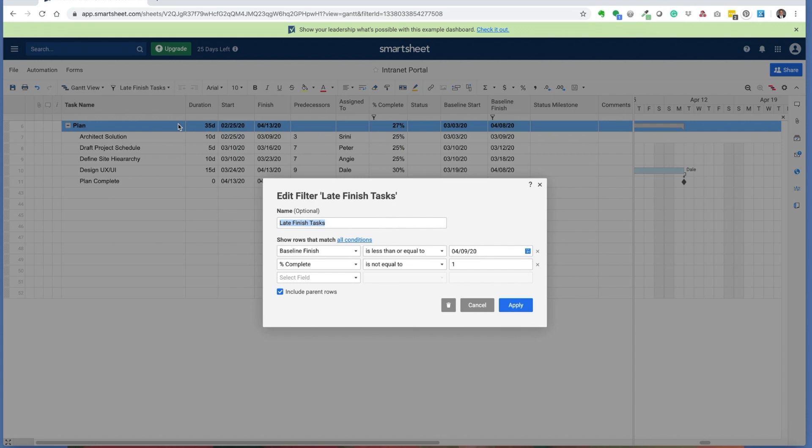Just to show you that again, you see here that we're simply setting the baseline finish date is less than or equal to a given date that you select, and the percent complete is not equal to one. Again, I also include the parent rows in this example.